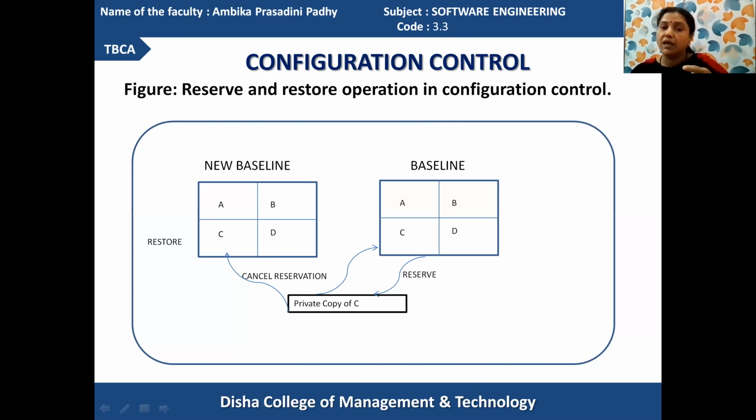To modify it, a private copy of the module is provided to the modifier, who requires the code to change. A new baseline of the original baseline will be prepared and can be modified by the modifier. Then after being modified, that will be updated into the original baseline again.